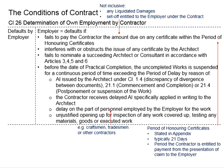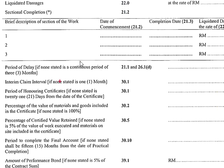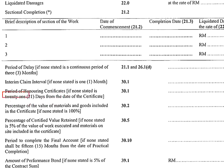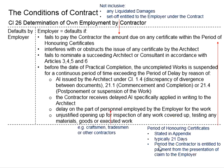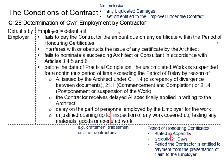This refers to the amount supposed to be given to the contractor within the period of honouring certificate. This period is normally clearly specified in the appendix of the contract. If nothing is written there, it defaults to 21 days from the date of the certificate — the interim certificate where the contractor claims for work done. Within this 21-day period, the contractor is entitled to payment from the presentation of the claim to the employer, meaning payment should be made within 21 days of the claim being presented.